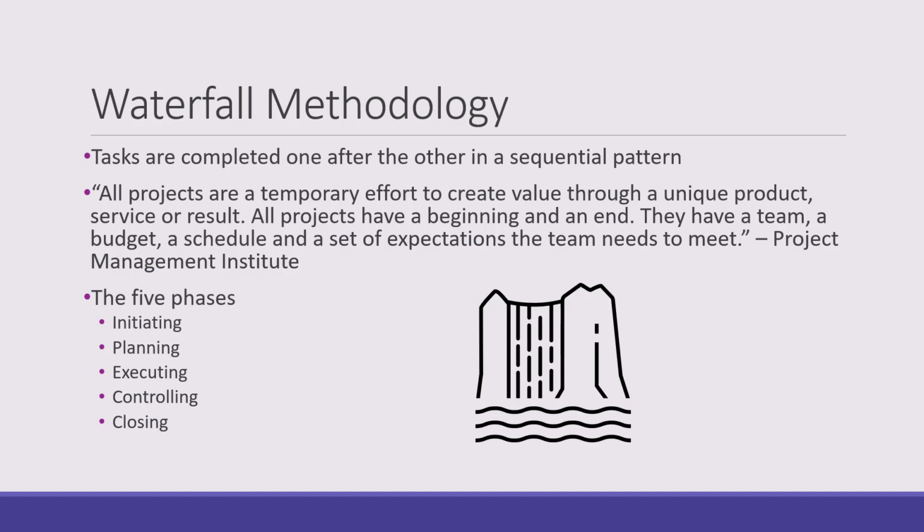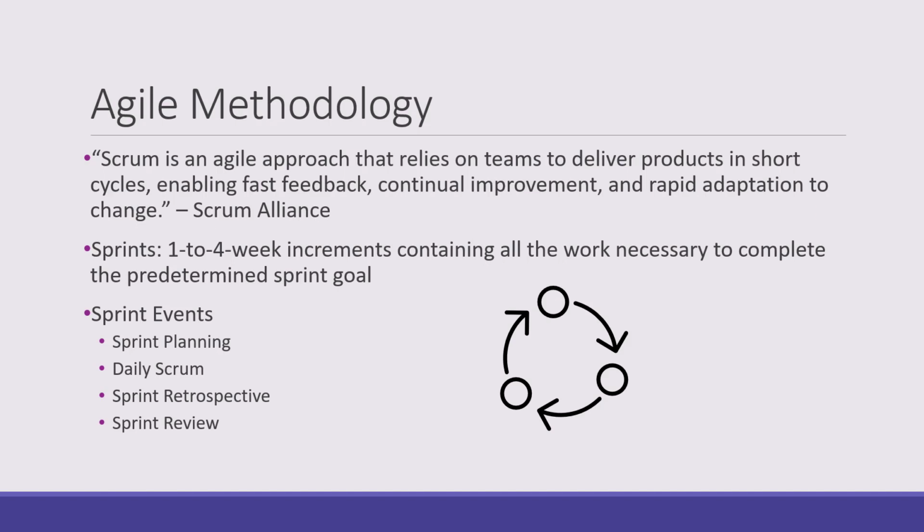Now let's discuss a little bit of a different way of breaking down projects. Agile project management. There are several types or flavors of Agile, and in this series we will be focusing on Scrum. This methodology takes the time aspect of projects and focuses on small, constant time boxes for each portion or iteration of the project. Instead of having an entire product or a new road as the scope, or what's included in the project, a 1 to 4 week increment is defined as a sprint.